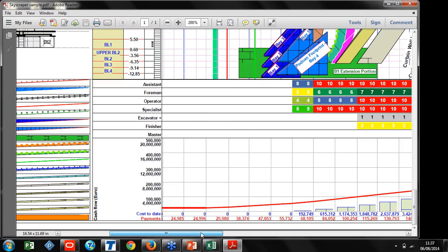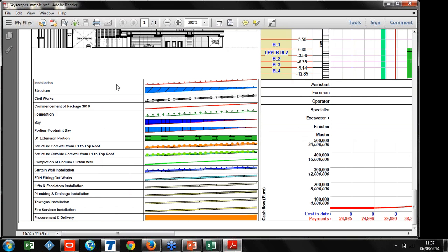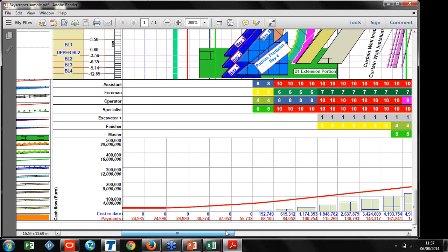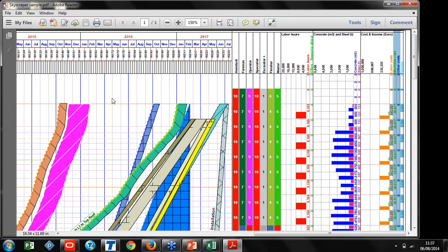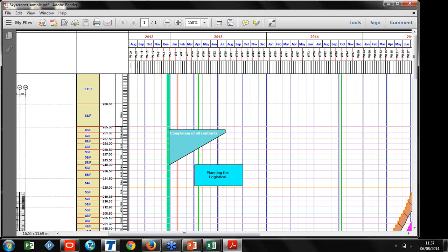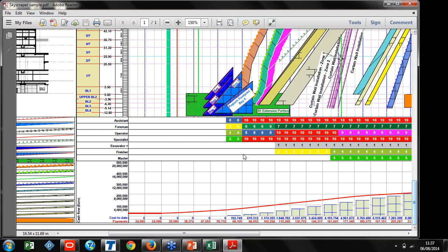And at the bottom, we have more information, and this helps the companies gain know-how on all your activity types. In other projects, you will be using the same template. So activity shapes and colors will be indicating information. They also help us to filter or group our activities from the same disciplines. A little bit further down, we have resource information for each duration, because horizontally it represents time. So at the bottom we have the information for the resources and also for the costs.